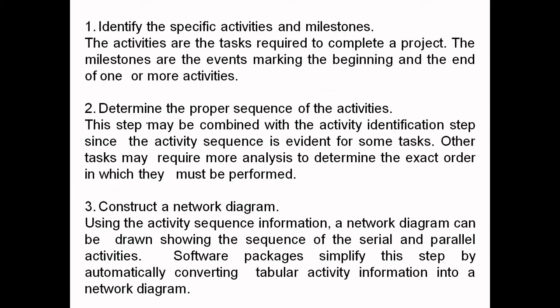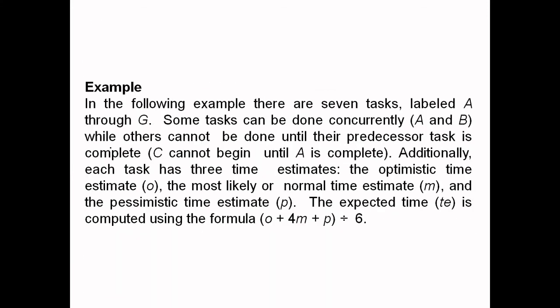Activities are the tasks required to complete a project. The milestones are the events marking the beginning and end of one or more activities. Determine the proper sequence: this step may be combined with activity identification, since the activity sequence is evident for some tasks. Construct a network diagram: using the activity sequence information, a network diagram can be drawn showing the sequence of serial and parallel activities.